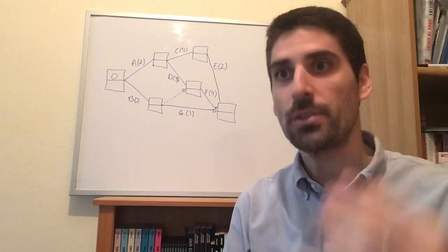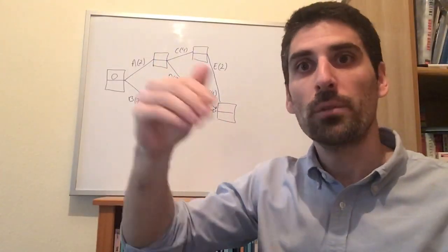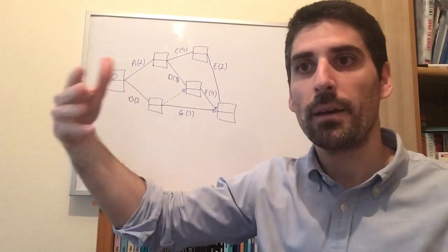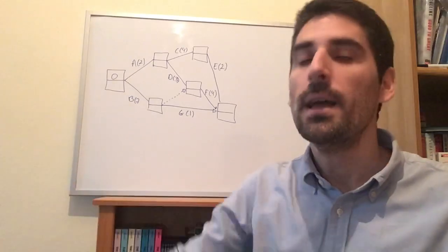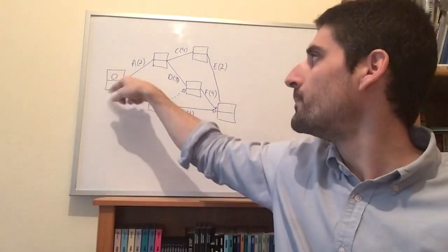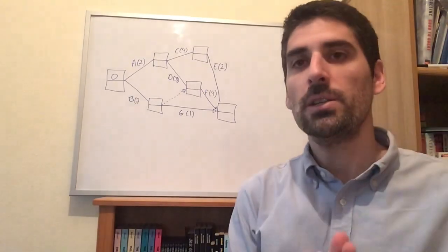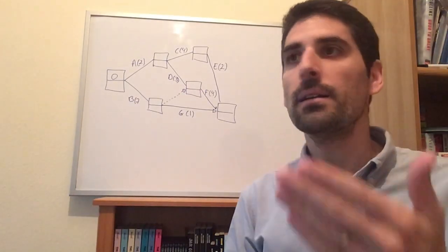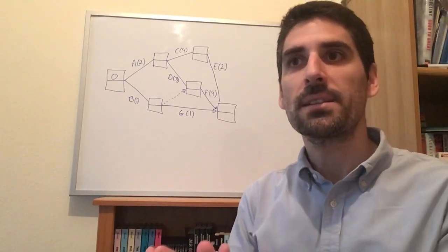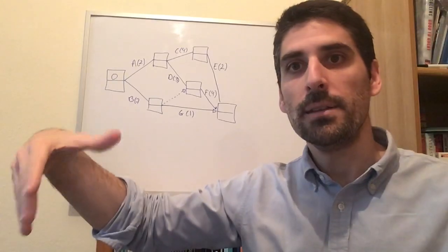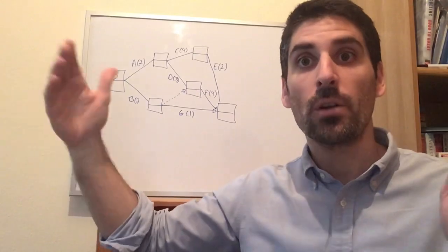From last lesson you will remember that each node was a circle, and we wrote in them the step that it was, the order that the activities took place, and I've replaced that circle with a double box. That's it, okay? And each box is going to represent the earliest time that we could start an activity and the latest time that we could delay the start of an activity without affecting the overall duration of the project.